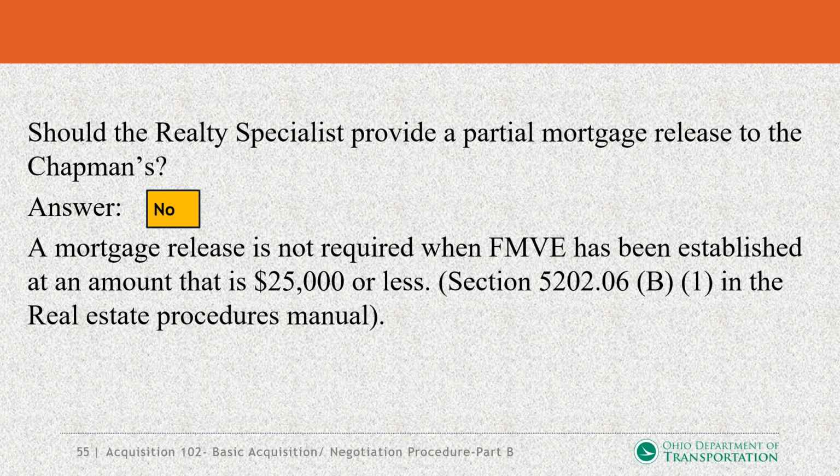A mortgage release is not required when the FMVE has been established at the amount of $25,000 or less. Of course, that's in our section 5202B.06B under the real estate manual.